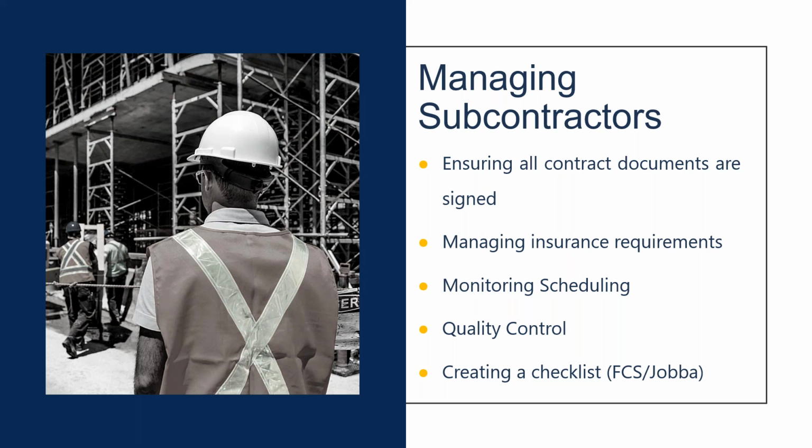One of the things that we're often concerned with is liability when you are relying on sub labor. So oftentimes sub labor may come on and they may not properly tarp a job. We're in storm season here in Florida, and we're getting storms almost every day. When that happens, you need to make sure that you've got a sub crew that understands the importance of not only drying in a job, but properly tarping or securing a job before a storm comes. So checking their insurance requirements is critical.